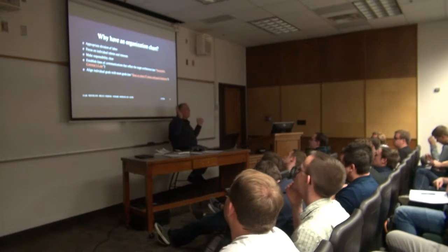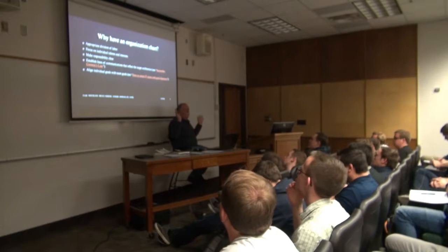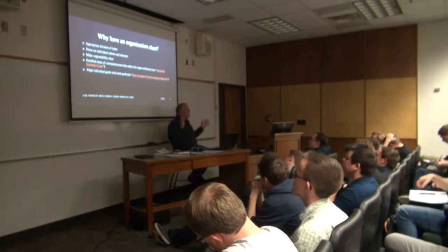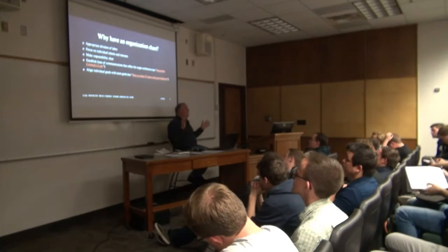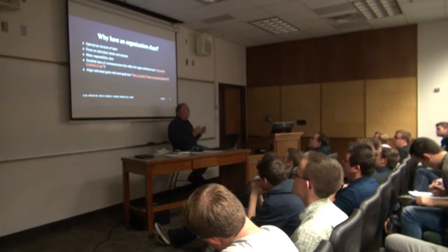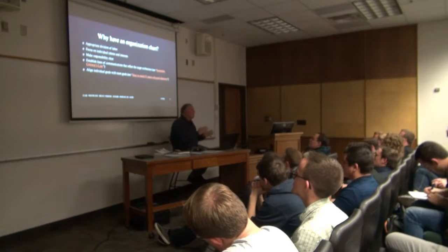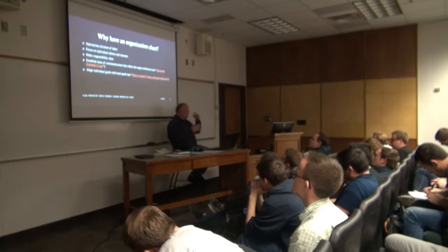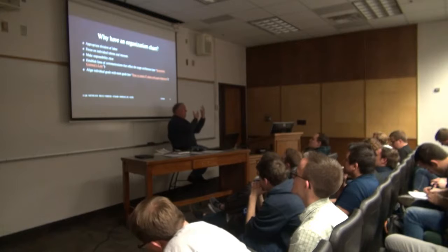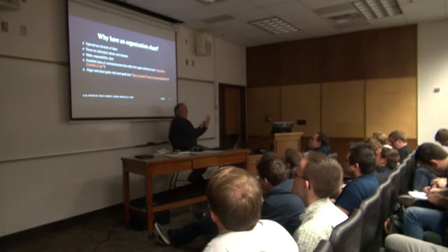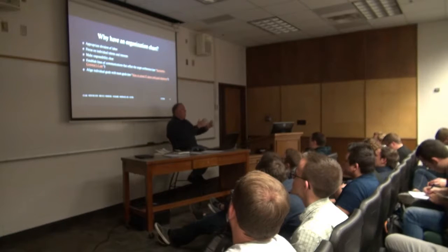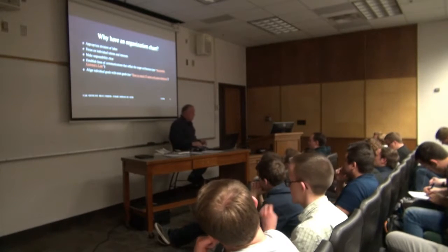Also, Conway's Law, something Brooks mentioned, you should have read about, which is that the architecture of a system under development reflects the organization that developed it. Because communication channels within the organization end up mapping to the interfaces. So what do you want to do? You want to organize your team to match the architecture you desire. Which is why in past projects, groups will often have the client or mobile device side development team, the server side development team, the database architect down here, and so on and so forth.